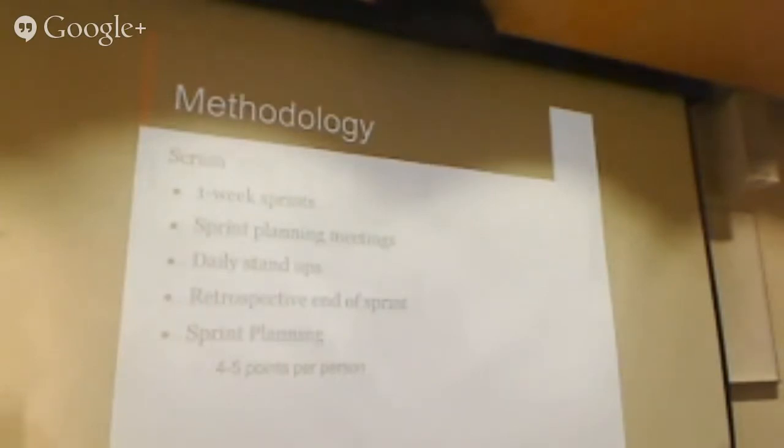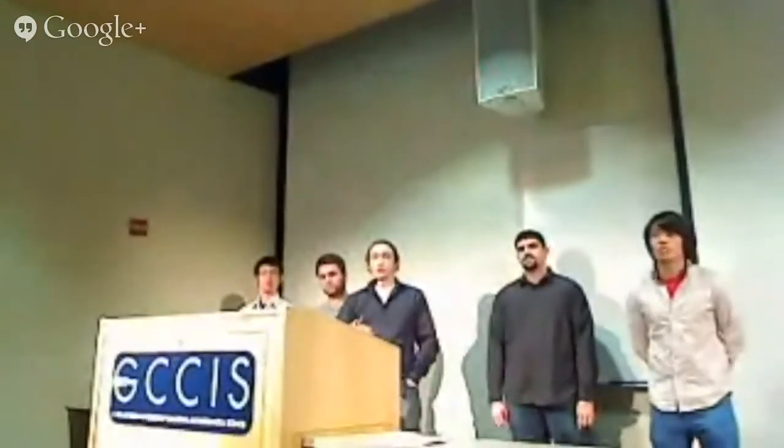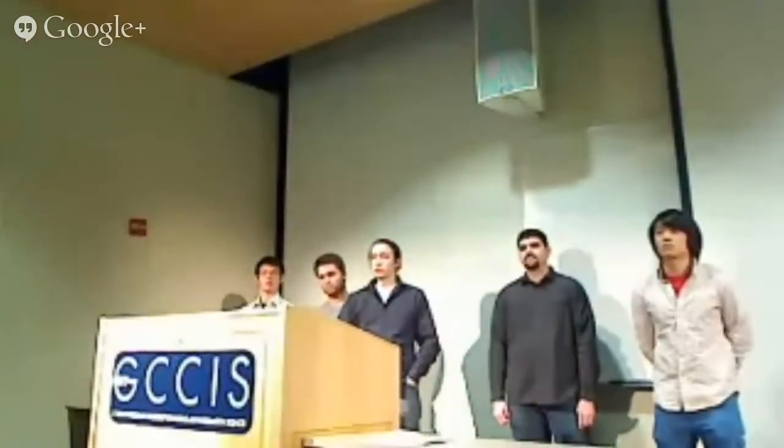Currently, we're working with 1-week sprints. Every week we'll sit down with a planning meeting in which we'll plan out what we're going to work on for the next week. After that, every day we'll be executing on this plan, and we'll have daily sprint meetings.